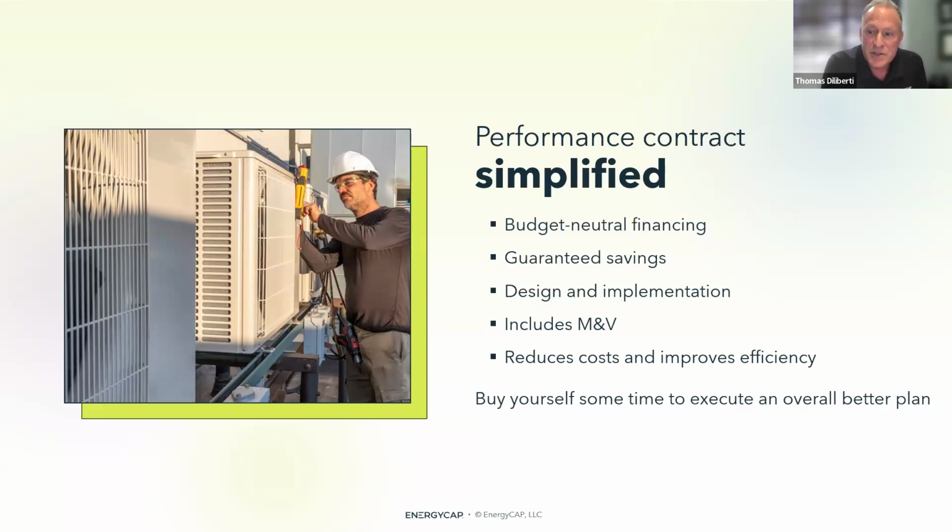And so I just want to teach those who don't know and just remind those that are in the middle of this, a performance contract might be the best solution for this situation. If you haven't been exposed to performance contracts, the idea is this: the energy savings pays for the improvement that occurs in the facilities. So the idea is that this is a budget neutral event. It comes with guaranteed savings.